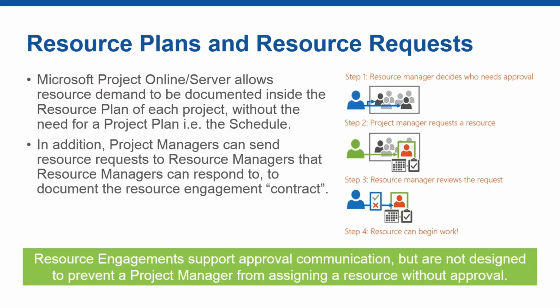But what we can now also do, and that really is what the picture on the side of the slide refers to, is send resource requests to resource managers. And that's a really new, exciting capability that didn't exist before. It allows project managers to get approval from resource managers to work with certain people on the project. This is done at a project level, not task by task, and it allows users to document a high-level resource agreement or a contract, if you will,